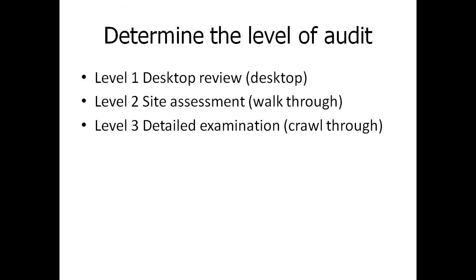And what I'm saying is the level is, do we consider a desktop review, which is all the information that we have at hand, and making some assumptions and some calculations on the condition and the risk of that particular element, whether it be mechanical, whether it be the external facade of the building, whether it be the roof. The next level requires more resources, man hours, more data management, but it's a little bit more accurate and will provide us with additional detail, both for corrective as well as preventative feedback. And this is a site assessment, a walkthrough.